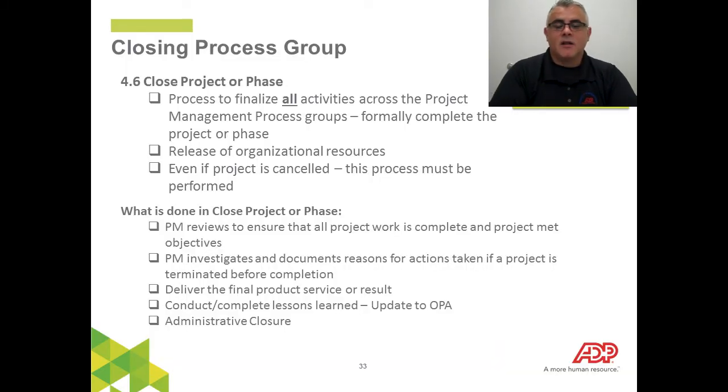So we're going to begin on the close process group. We're almost to the finish line with integration management. In the close process group, all projects are required to go through this particular process. And one thing to note is that even if a project is in the middle of the work and let's say funding runs out, the plug has been pulled, the sponsor no longer wants it, the contract's been terminated, you have to still close the project because the project authorized resources and funds and systems, and you could have a team of people who, in the middle of the project, it gets canceled, you need to know what to do with these people. So part of the close process, regardless of how the overall disposition is going to end up, you need to go through close project.